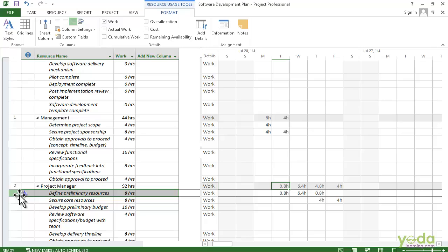Now you can't create custom contours, but you actually can edit the hours in this grid. So here, for example, I could type in 1 hour on the first day itself. So here let's make changes to 1 hour and 2 hours on the second day in this grid. You can see that the indicators change to add a pencil, and that shows that you have edited the hours in this grid. All the work contours lengthen assignments.